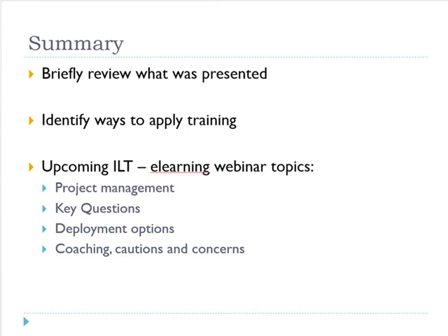And we have that defined by a from-scratch project, a transformation project, and also various levels of depth and scope, and try to identify that at the kickoff meeting and get everybody to sign off or buy in on it, if that answers that question.